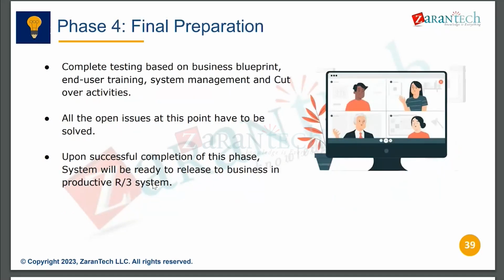And this is final preparation. All the user acceptance tests as per the blueprint will be completed, and user trainings will be done. System management and cutover activities will be finalized. So all the open issues.